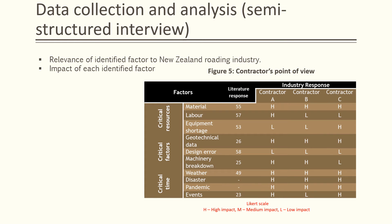Based on the systematic literature review, semi-structured interviews were organised with three local field experts. The contractors interviewed during this study had a minimum of 10 to 15 years of work experience in the New Zealand road construction industry. Figure 5 represents the contractors' point of view on the data identified during the systematic literature review. These factors were further divided into three major categories based on their characteristics. Material, equipment, and labour are identified as critical resources, whereas design error, breakdown, and geotechnical data are identified as critical factors. Weather, pandemic, natural disaster, and events fall under critical time characteristics. The semi-structured interviews helped us understand the elements of these factors specific to the New Zealand roading industry.